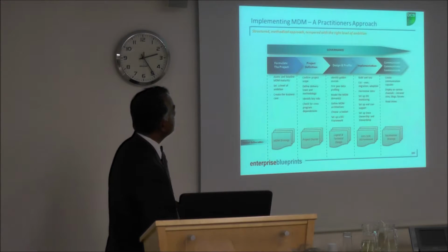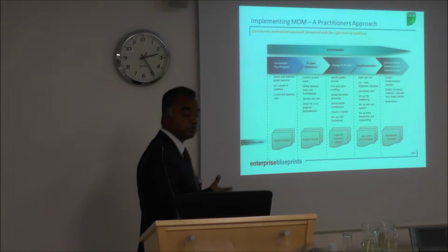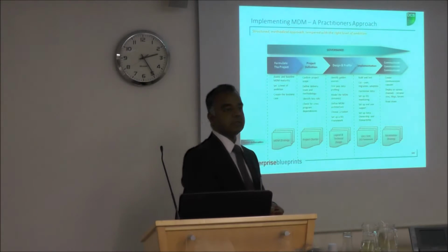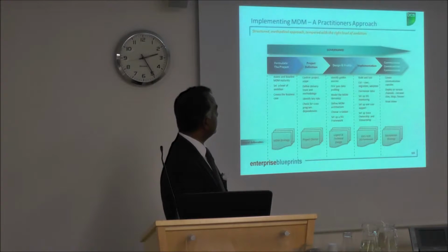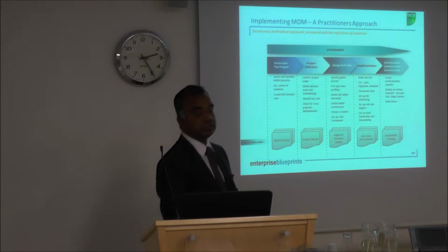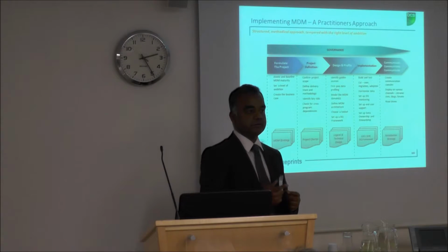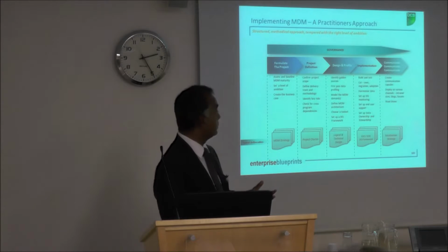In terms of the project definition bit, you obviously begin by confirming the project scope, which comes from your topology, as in where would you like to actually implement this master data management project. You define the delivery team and the methodology, and this is where you start looking at whether you want to do it in a prototype, iterate, apply, and then re-prototype sort of fashion, or you want to do it top-down in a waterfall fashion, and so on and so forth.